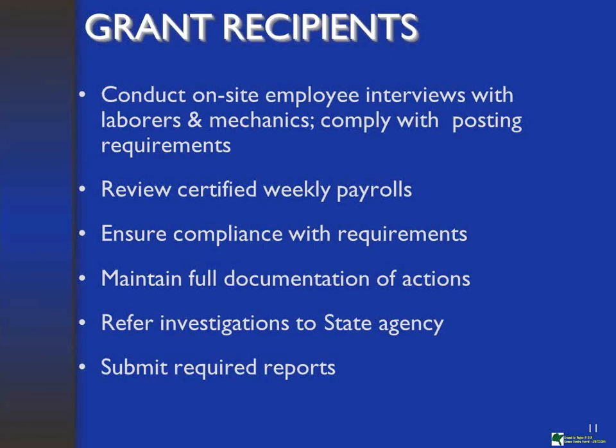But we entertained it and met with the gentleman and brought the payrolls out to show him what we had received from the contractor. Well, lo and behold, as he looked down them, he was misclassified in some areas, and then the biggest issue, and I'm surprised it wasn't asked in the other session, was taxes were being taken out for him. But he did not know that taxes were being taken out for him, yet on the other side, he was facing a tax liability to the IRS.